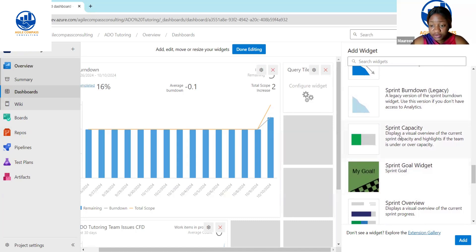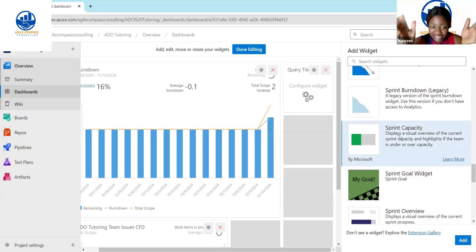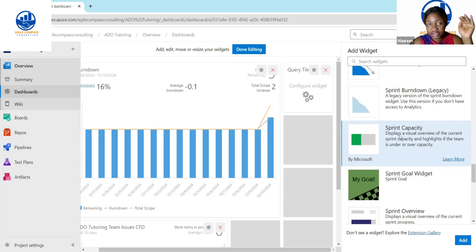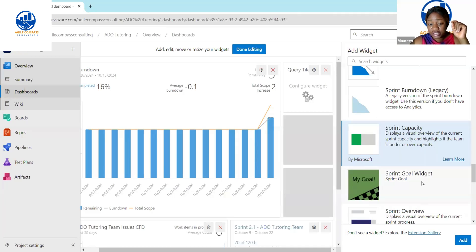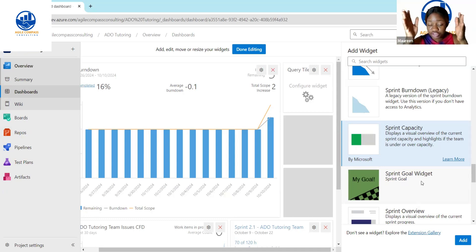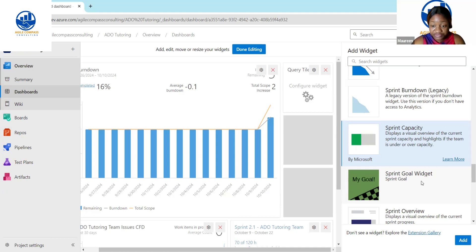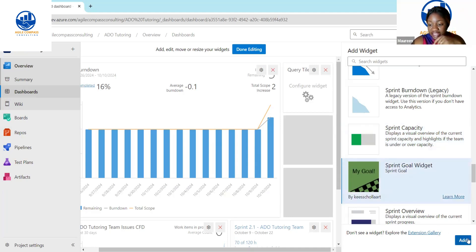I love to see Capacity — this is a big one. When showing the dashboard to the team, you want to see the number of days left in the sprint and the capacity. The capacity will show you committed versus completed, so you can see if you guys are over-committing, under-committing, or just right. You also want to see the Sprint Goal. Even though the sprint goal shows on your board, having it on your dashboard helps everybody stay focused on the goal. I'm going to click on Sprint Goal and add that widget.